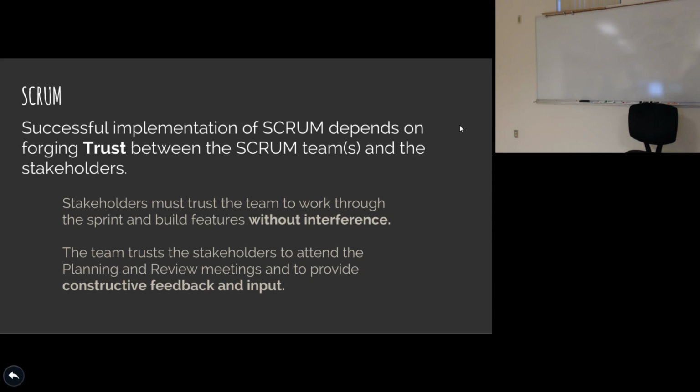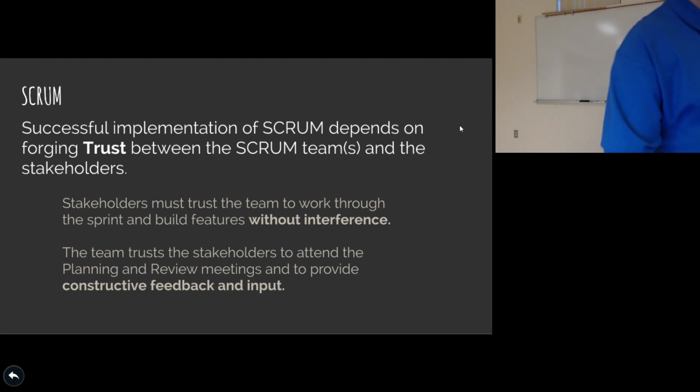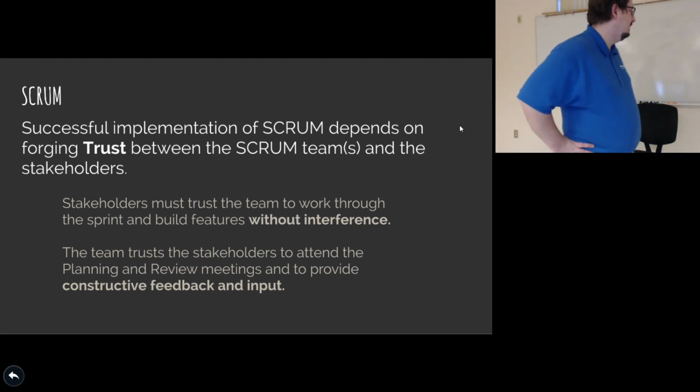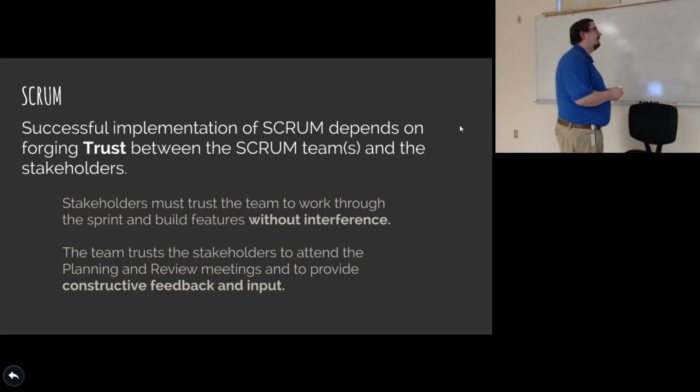So is the idea that story points are the thing, because we think, I want each sprint to be worth 8 points. Right. So when we're planning the sprint, we might say this team's velocity, or how much they're going to do in that sprint, is like 20 story points or 80 story points or whatever it may be. So the general thing we do is estimate how big those are in the backlog, and then we'll say, okay, we'll take 20 story points of stuff to do this sprint, because we think that's roughly how much we can get done. Okay.